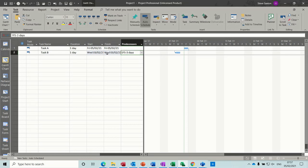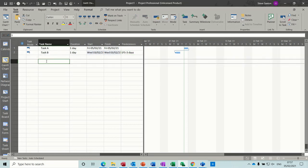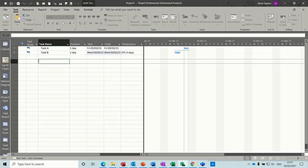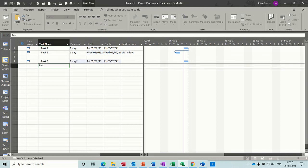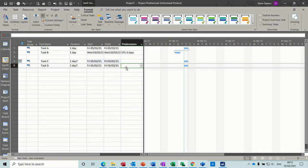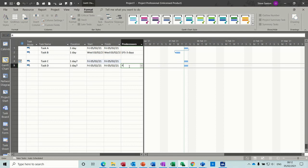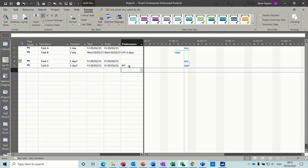Now, if I just do a couple more tasks, task C, task D, if I do a finish to finish link on this one, so that is going to be 4FF. You can see it does the link.